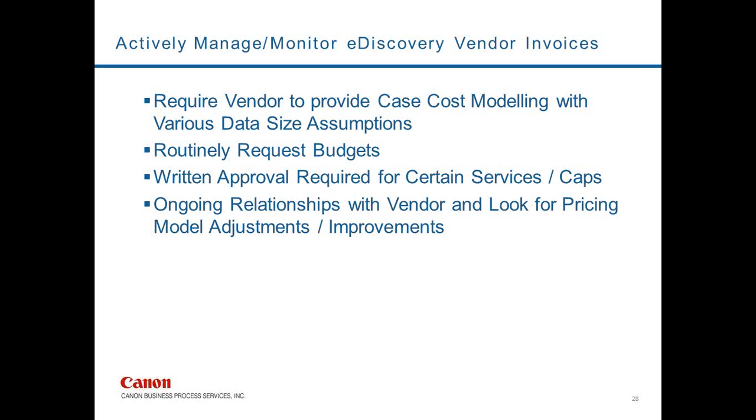And I think what's important is you want to be able to create cost models that you can manipulate in an Excel spreadsheet or in some other type of model, so that you can see what happens when the data size triples, or what happens when your anticipated relevancy of 20% jumps up, your keywords are bringing back 50% of documents, and see how that affects your case modeling and your pricing.